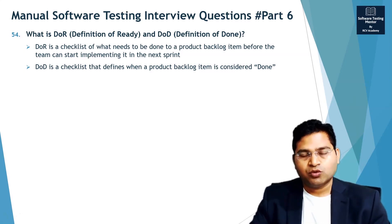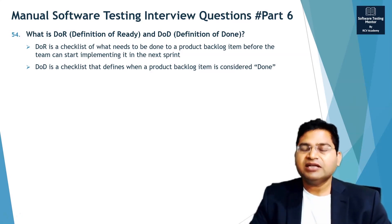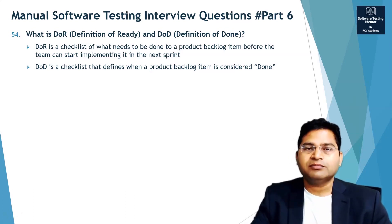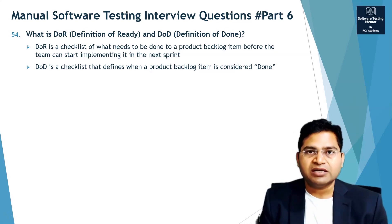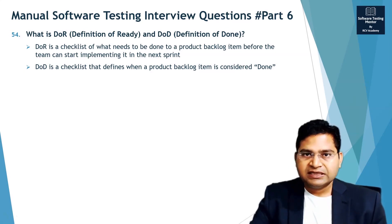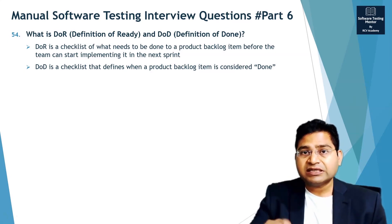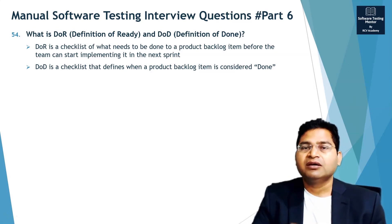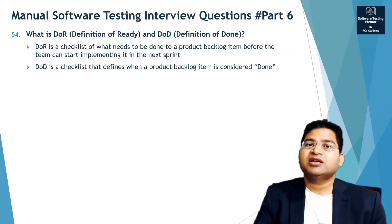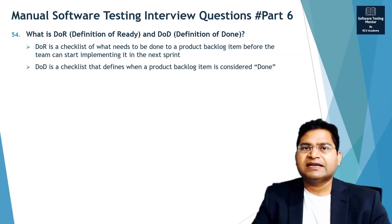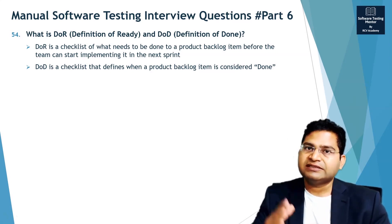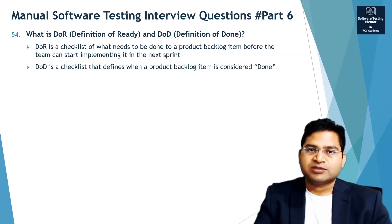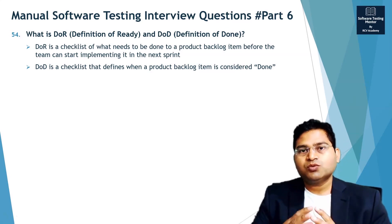Definition of Done is a checklist that correlates with exit criteria and defines when a product backlog item or user story is considered done. For example: development has completed, all testing has completed, there are no outstanding defects — these are checklist items for Definition of Done. The story has been showcased to stakeholders, stakeholders have accepted it, and no further changes are required. Once all these items are satisfied, you can consider the user story completed as part of that sprint.